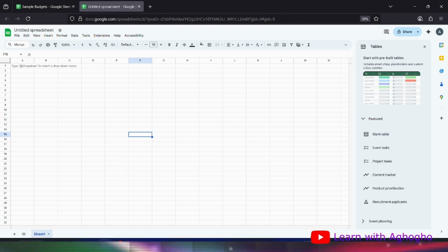As project managers, some persons tend to overlook the area of contingency, but I would advise that for you to be able to have a successful project, it is very pertinent that you consider your contingency. On our project plan, we will be using 15% of the total amount that we have considered in the course of evaluating the project for our contingency.